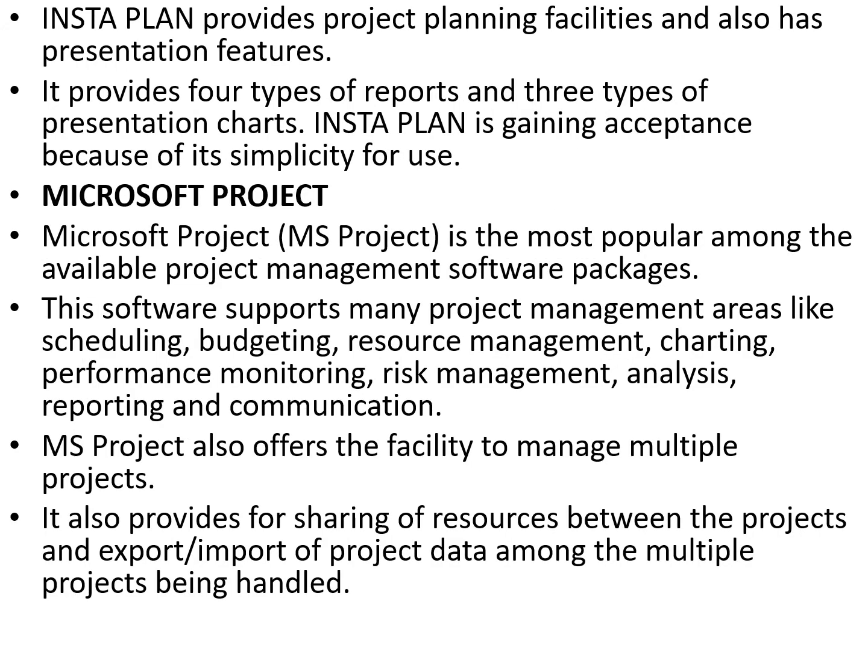Project estimating involves assigning a price to each of the project tasks. Each task is then rolled up into overall project estimates. In a perfect world, the actual project cost will always fall within the estimates. A good PMIS will track the estimated cost of each task as well as the justification for the estimates.